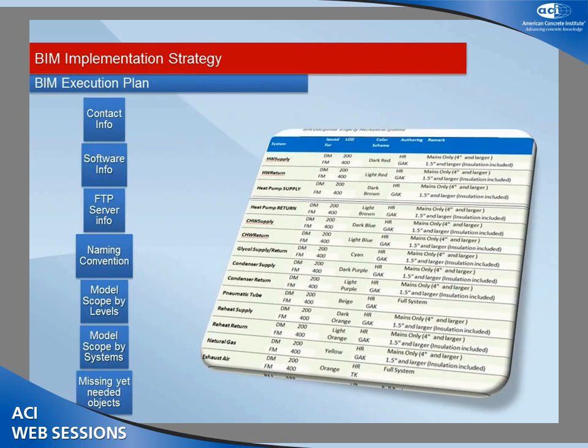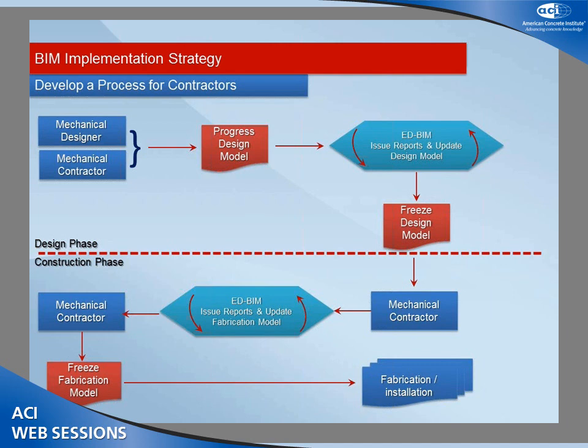There's an example of the execution plan. This is emerging as a standard in the industry — if you're going to get different companies to collaborate, each with their own standards, it's very important to come together at the beginning of the project to get all the different players on the same page about how you're going to exchange information. Do some testing to make sure the models can come in and out of various systems so that as you go forward you have a plan that everyone follows and things actually dovetail.